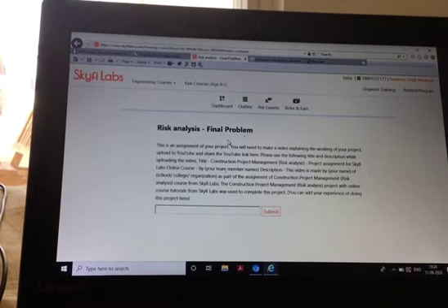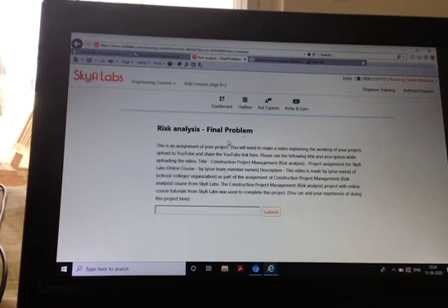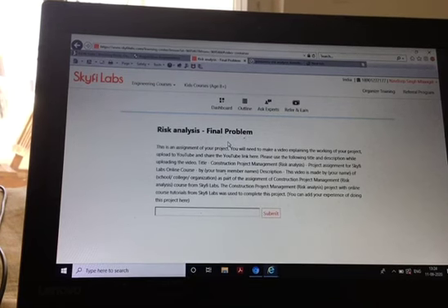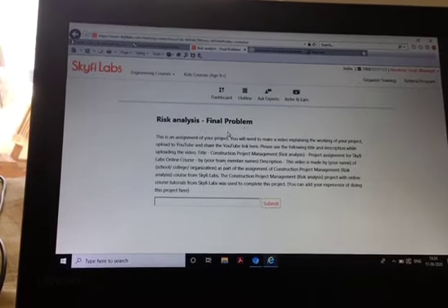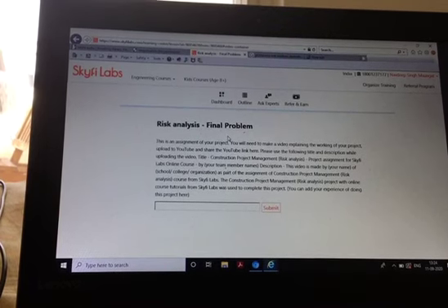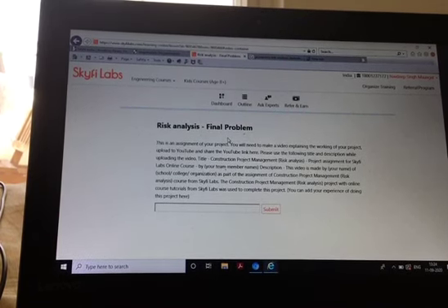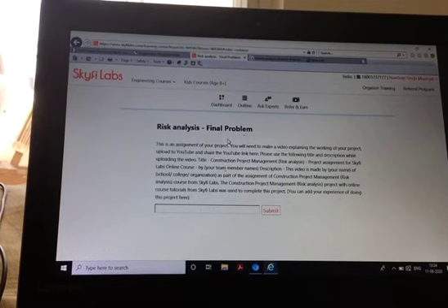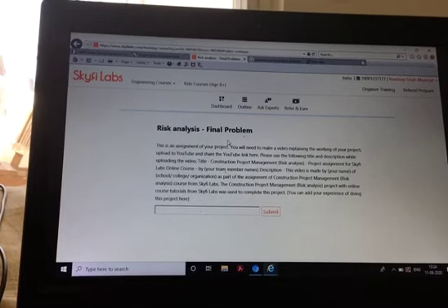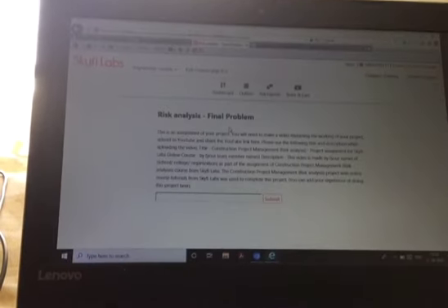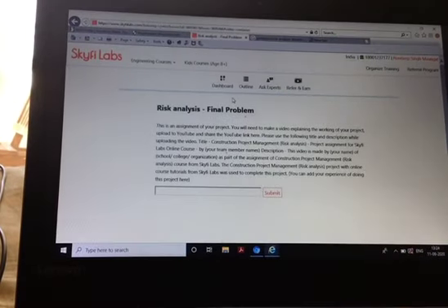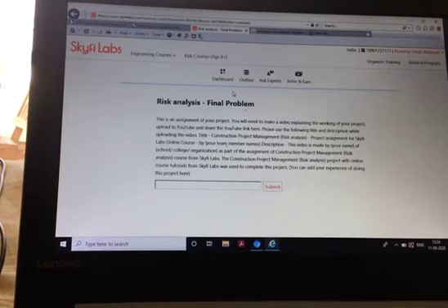So after the calculation of expected time, we have to figure out the critical activities in the given project, right? Only then will we be able to find the project variance value. So it is very important to note that the critical activities give us the project variance value, from which we'll calculate standard deviation and Z score values.